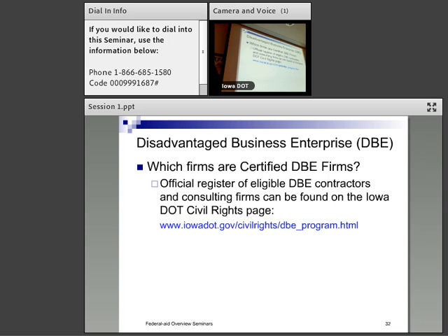that was going to be paid to the prime contractor. What we found, starting probably in the latter part of the fall, was probably 8 or 9 contracts in which the commitment had not been met. The dollar for dollar commitment had not been met for a variety of reasons. And what we also found is that in some instances, some of these could easily have been corrected had there been contact made on the job site and also with the civil rights team very promptly at the time.